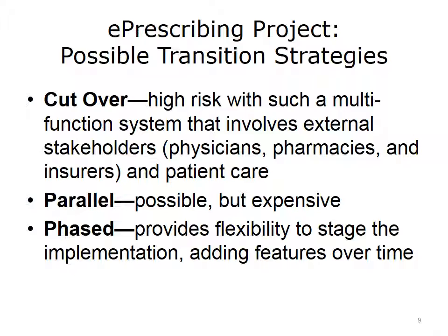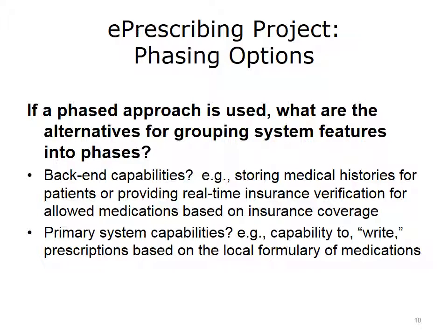Phased approaches can be used in various combinations. In a phased approach, start with having the medications the patient is currently on entered into the system over a matter of weeks or months. The next phase could be having the prescriber print new or changed medications out of the system and giving the patient a written or printed prescription. The last part could be phasing in the e-prescribing, where the physician sends the prescription electronically to a regional pharmacy. Talking about options also raises the question of how to partition the system into phases, which could include back-end capabilities such as storing medical history or providing real-time insurance verification as separate activities.